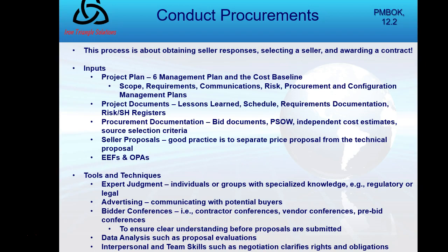Seller proposals. Now, if the seller is going to submit a price proposal, a good practice is to require that it be separate from the technical proposal. You want to evaluate the technical proposal first, make sure it will work to meet your need, and then the price proposal on top of that afterwards. That is a common good practice.